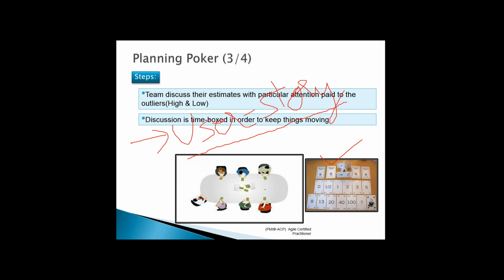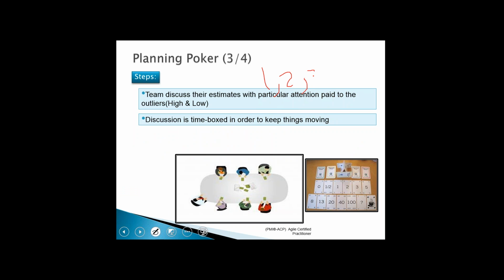No one has to show their estimates to the people sitting beside them or anyone in the room. So you hide that planning poker card first. And you as a facilitator would say 1, 2, 3, go. Everyone should raise a card which they feel is apt at one go. Everyone at one go.